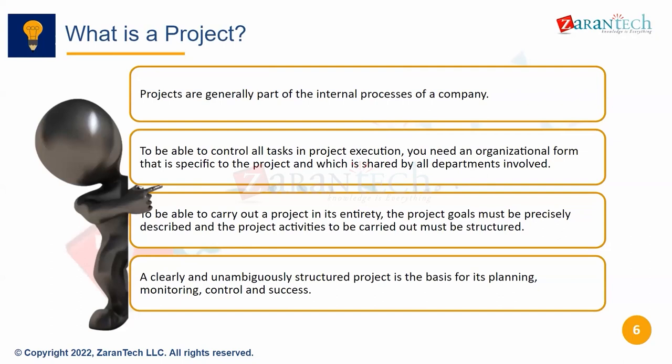So if it's a small project, where you don't need to keep track of schedule or material planning, internal order will be sufficient. But when complex projects are involved, you will need the SAP Project System, the PS module.